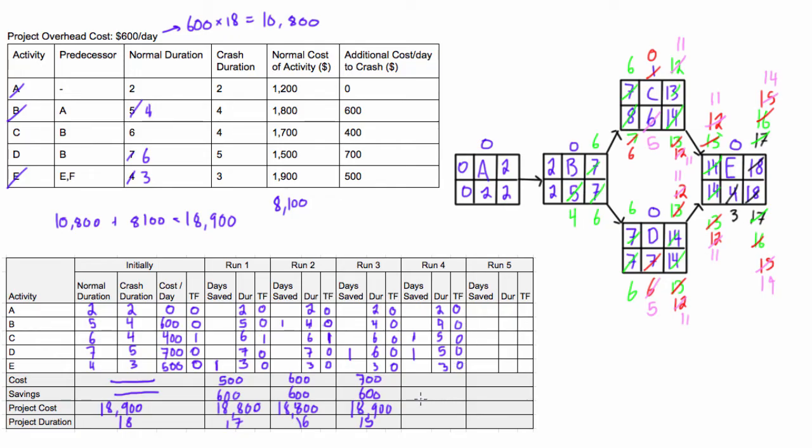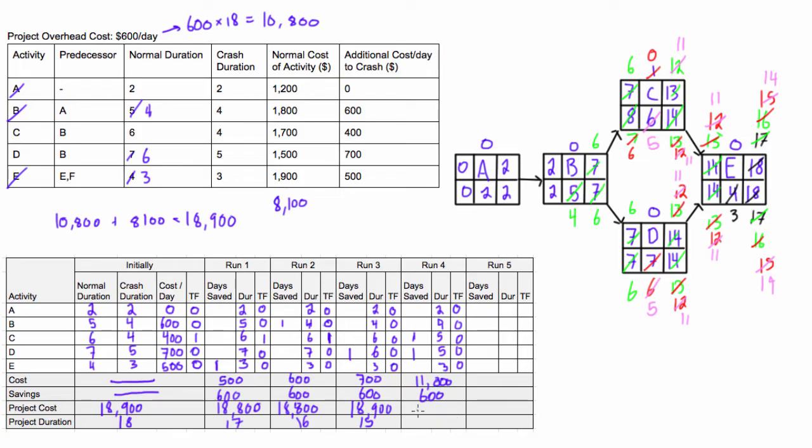Now, in this case, we spent a little bit more money. We spent $700 plus 400 because we crashed both of these in this one, excuse me, in this one step. So we spent $1,100 in this step. $1,100. We saved 600 from that, saving that one day of overhead. And this is going to bring up our total to $19,400. $19,400. And we've reduced the duration of the project to 14 days. All right. And let's go ahead. We can even just record this here. So now we got 5 and 5.